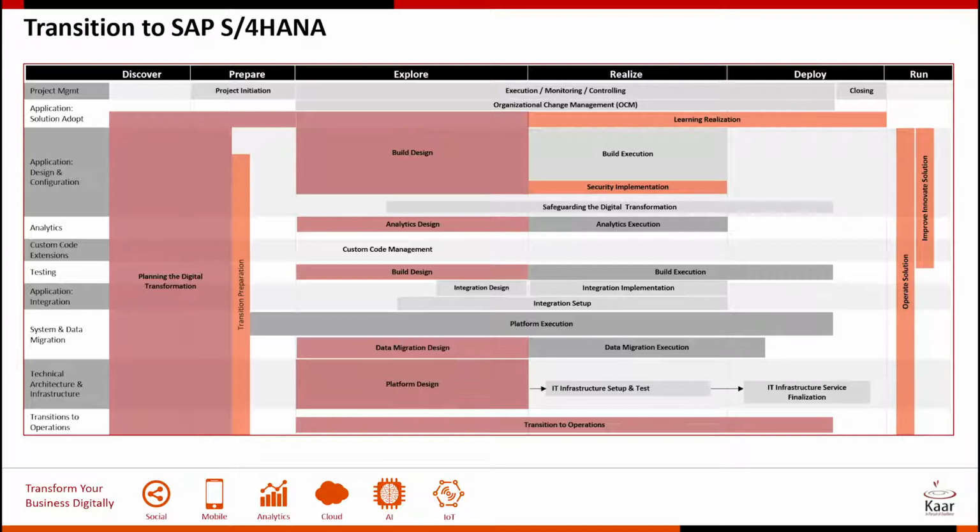The system and data migration. This is planning and the setup of all the S4HANA system as copies of prod, because that's where you're going to do all your mock conversions, your development conversion, and your quality conversions. And also setting up the identifying the data migration activities, because data migration is a huge step post running the SUM tool for the conversion.